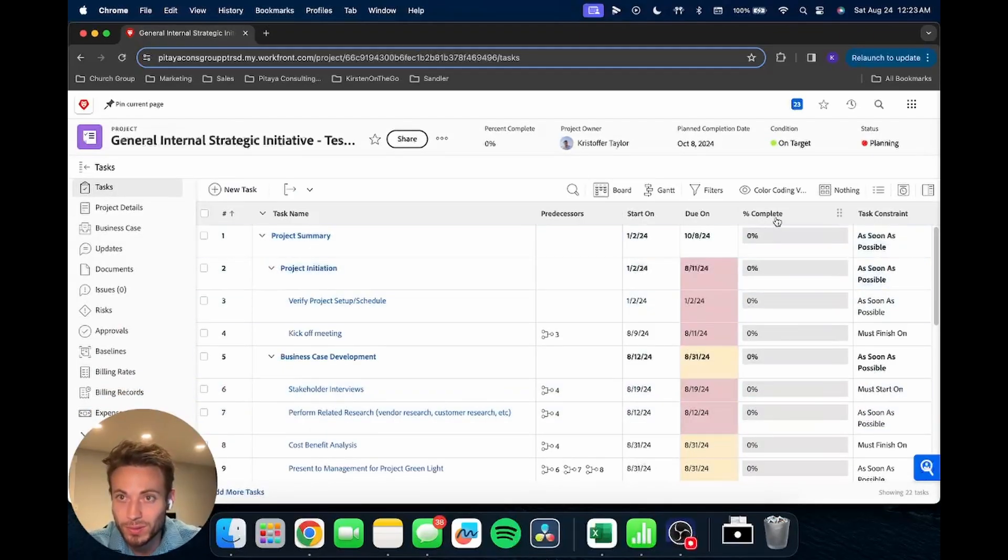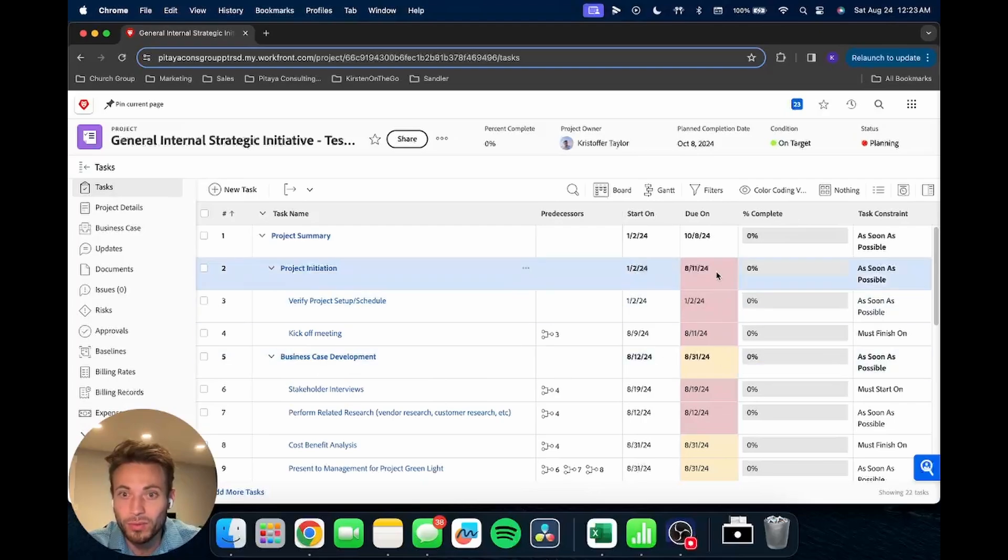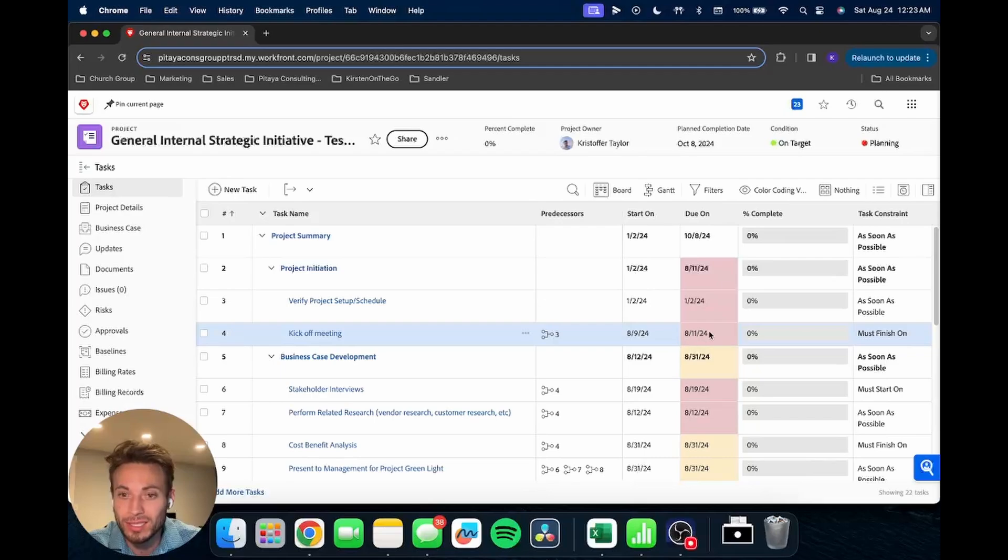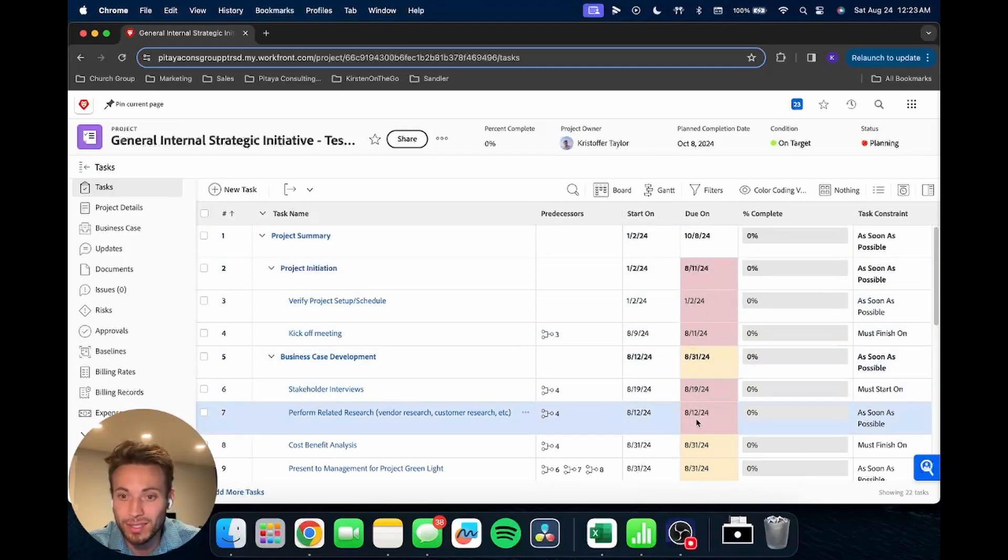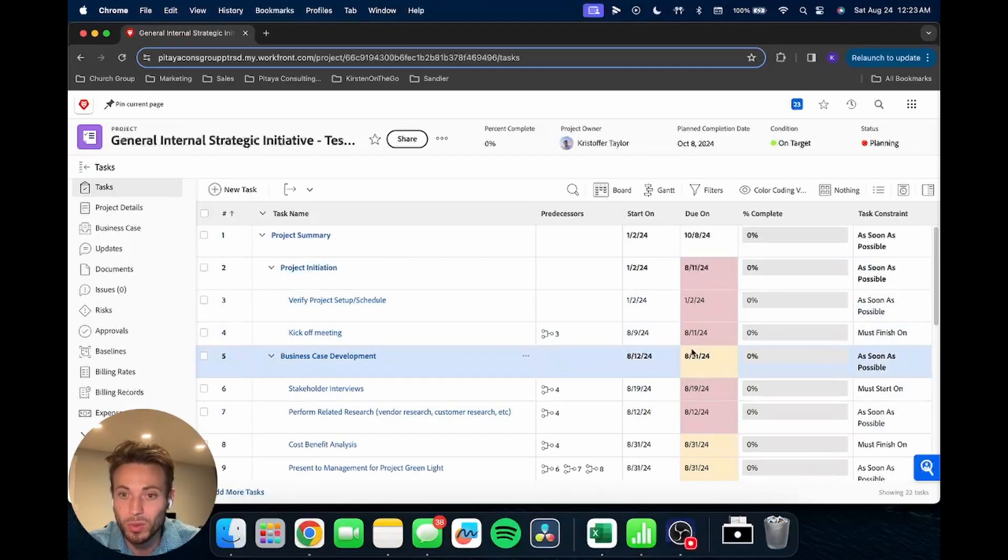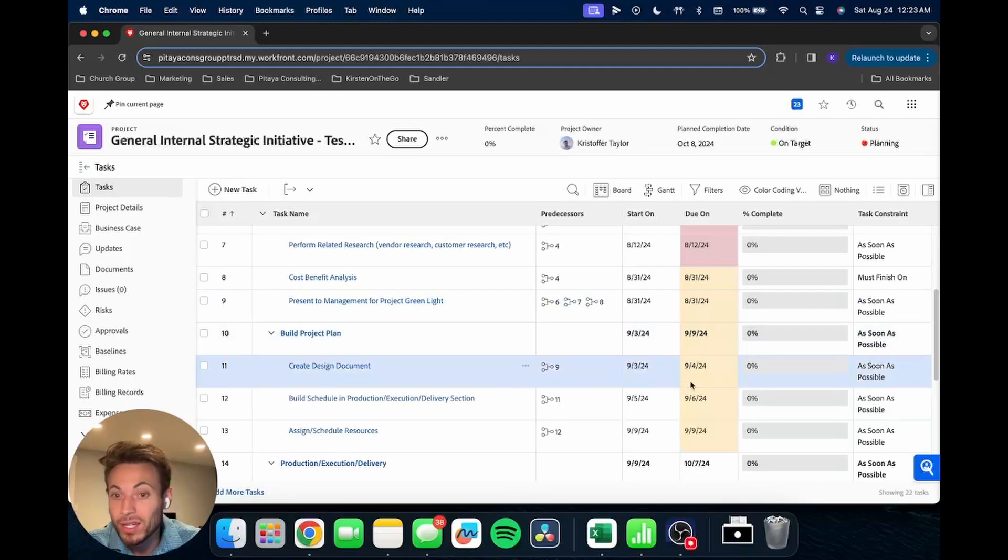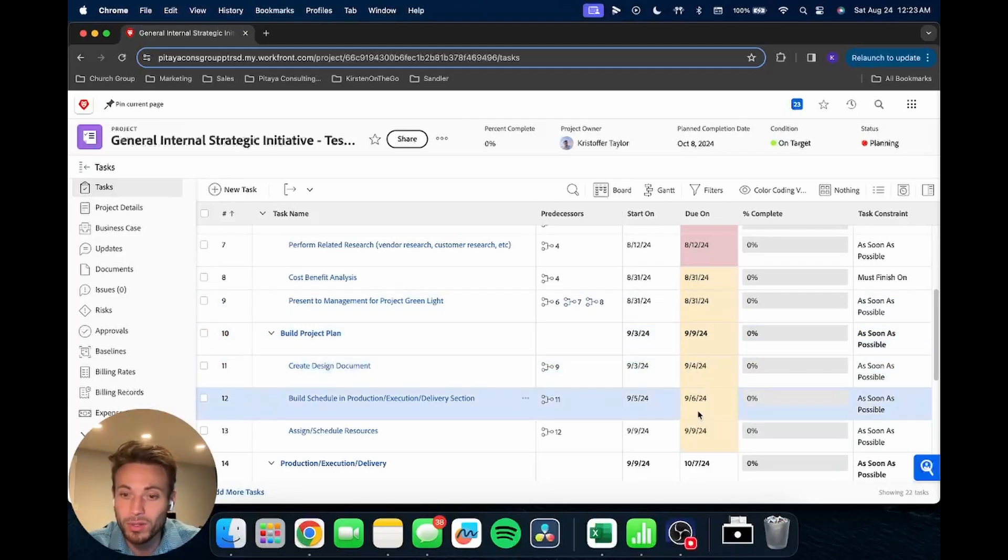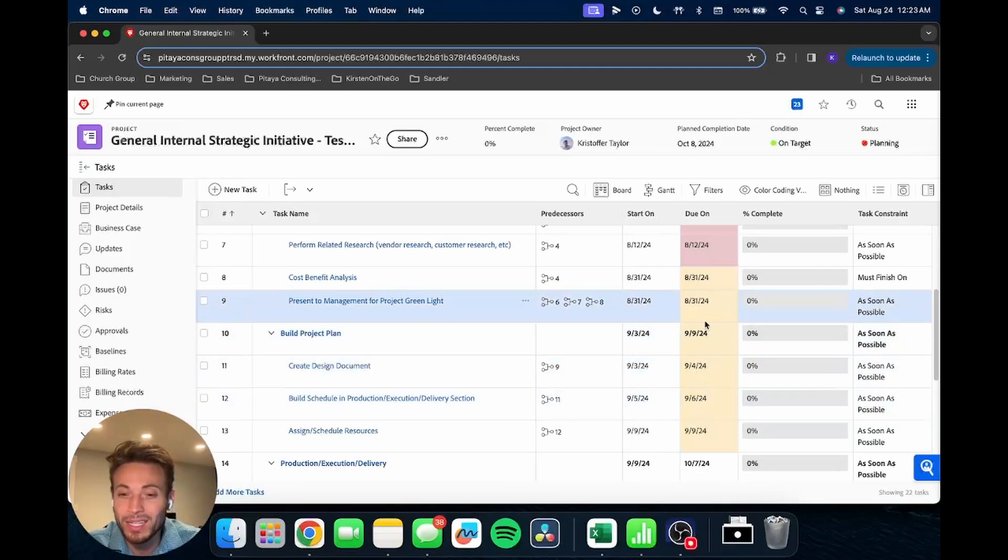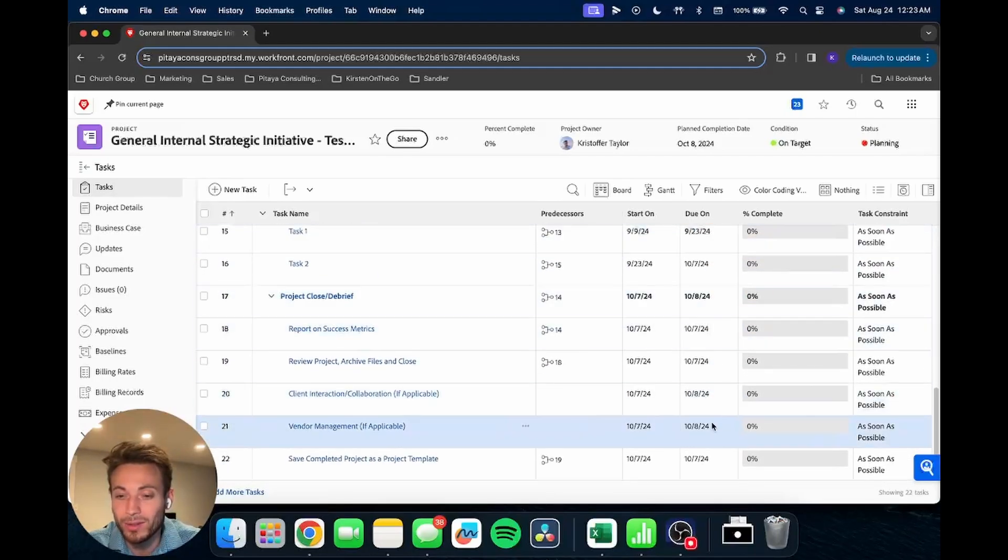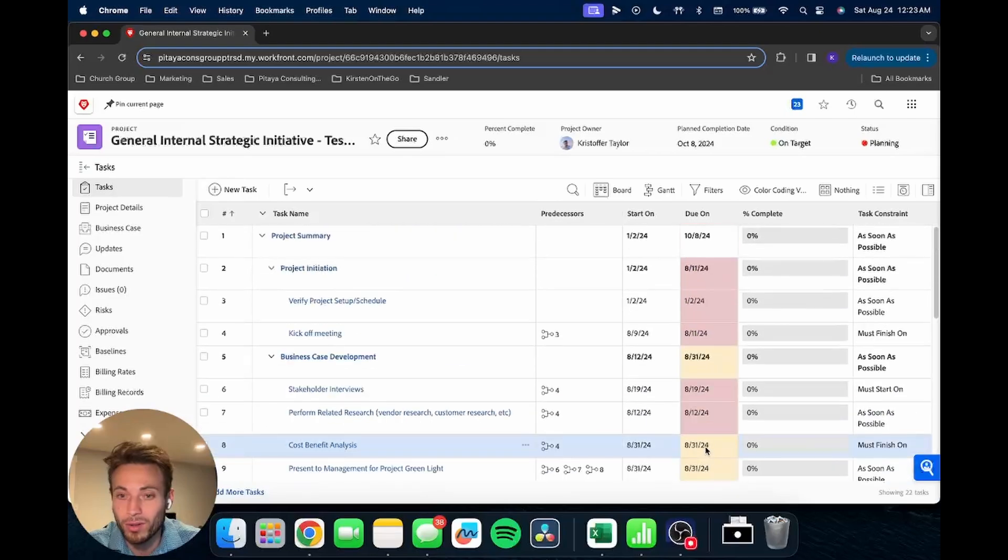Okay, here it is. So today's the 24th, and you see if the due on date is in the past, as these are, it will show up in red. If it's in the near future, meaning within the next month, it will show up in yellow. And if it's beyond that, it will have no color coding.